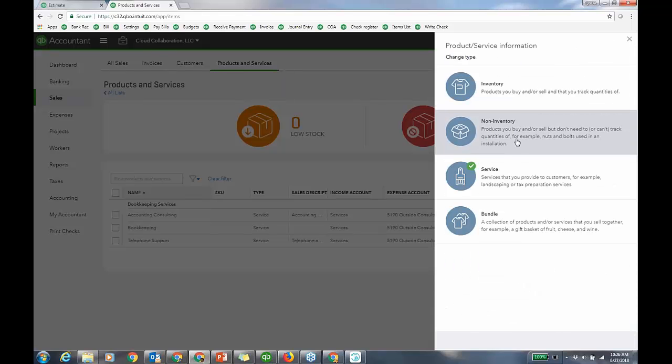So you have these types, right? You're probably not doing a lot of inventory with job costing because you debit COGS when you sell it. So most contractors are going to have non-inventory parts, as you know. They use bundle items a lot, though, so the customer doesn't see all the phases of the job. It's just the description and the amount. So bundle items are great to put on an estimate and invoice. And then a bundle item would just be composed of either non-inventory service items. Right? So this bundle is a group item, not a build assembly, a group item.